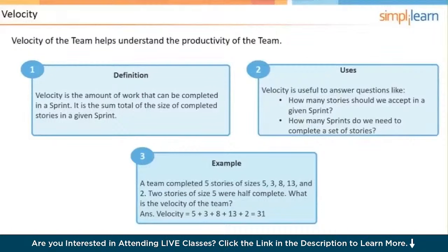And it is an observation. It's not a prediction. So if we're working on sprint 5 and we're working on determining what our velocity is, then it would be the average of the previous 4 sprints. If there were any outliers, you would disregard those.